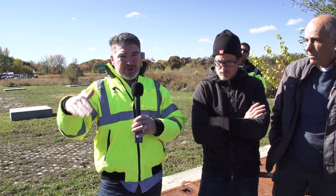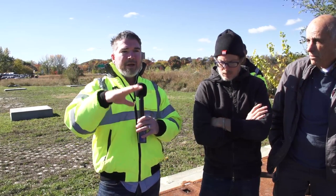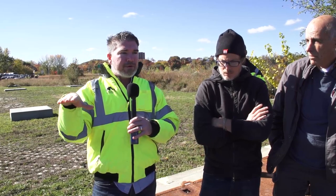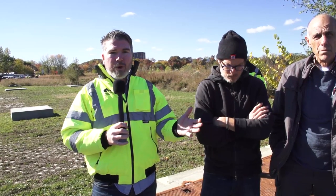And what you need to protect against is the weight of the soil on the outside of the excavation, as well as the hydrostatic pressure, that's the groundwater level that wants to knock those walls over. It's a very similar condition whether you're building it at the head end site or the park, because the groundwater levels are so high. And we build structures like that, next to the water, every place.